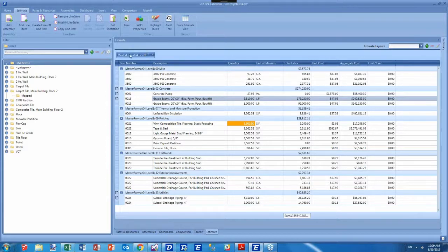So in this case, right now, I'm grouping it by master format level 1. But as you all know, you can drag and drop any amount of columns up here that you want and break your estimate down however you'd like. And now it will automatically total your calculated WBS properties. So all of your formulaic WBS properties can now be calculated. And that actually can be driven very quickly by right-clicking below and hitting sum. And it'll automatically create sums here.